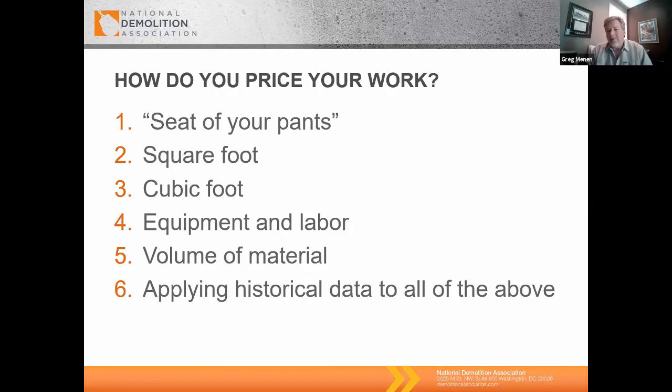Well, the difference is really if we have a piece of equipment that is a smaller excavator, but I have 20 of those, that makes it easier for me to run around to complete a lot more commercial projects. And then we get into a multi-story structure. The way I estimate it, because I have those smaller pieces, is going to be different than maybe my competitor who might have a high reach and says, hey, I can do that with my high reach and I can get through it in this manner, versus somebody who says, hey, I have a lot of remote control pieces of equipment, or a Brokk or a Husqvarna, or one of those pieces that you can use mechanically and have had great success on, and they'll go floor by floor. I've seen a lot of structures come down like that.